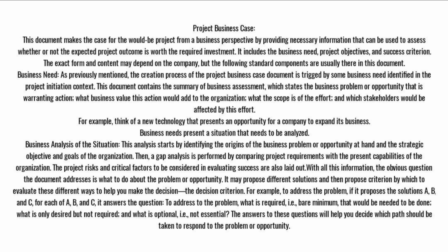For example, think of a new technology that presents an opportunity for a company to expand its business. Business needs present a situation that needs to be analyzed. Business analysis of the situation. This analysis starts by identifying the origins of the business problem or opportunity at hand and the strategic objectives and goals of the organization. Then, a gap analysis is performed by comparing project requirements with the present capabilities of the organization. The project risks and critical factors to be considered in evaluating success are also laid out.